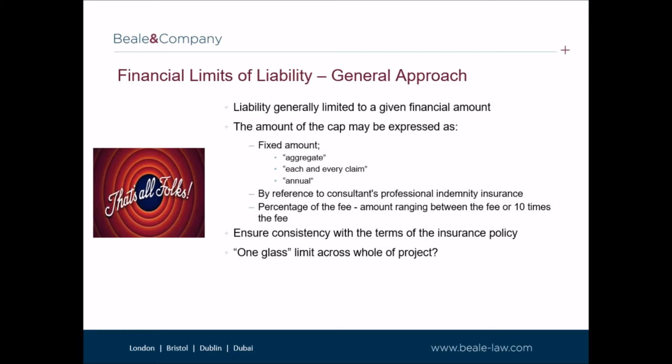Does it include variations? Moreover, does it mean the fee payable at the time of the claim or when liability arises? The amount of the fee in all these examples could be different.